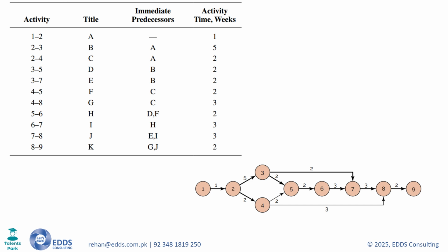First, there is no slack time on this path. So, any delay in these events will directly delay the project, unless the lost time can be recovered later on the same path. Second, these events are the most critical for the project's success. Management should focus closely on them to improve overall performance.